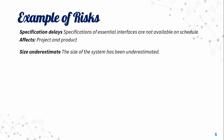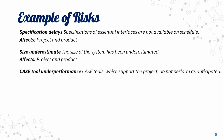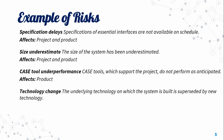Size underestimate — the size of the system has been underestimated. We were able to use case tools to help our project. Technology change — the underlying technology on which the system is built is superseded by new technology. This relates to the technology and programming language used in the environment and marketplace.